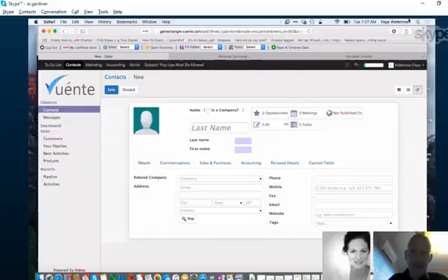On Sunday night, your reports arrive before Monday morning, and the research is actually still in code. You can, based on factual data, say, listen, person X, we were going to get this research done on Friday. My report tells me that it's not done. It's a logical, data-driven conversation. It's not the person saying, yes, I've done it. Well, if you have, why didn't you drag it to done? Make sense? Yeah, so completed.